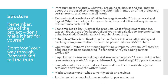Next is technological feasibility. What technology is needed — both physical and logical? What technology, if any, can be repurposed? Remember, a requirement from the Gatwick Tales Association is that they don't want you to reinvent the wheel. If they've already got an internet service provider or Cat5 cabling in every room, don't reinstall it — just use what they've got. You can make some degree of assumption there, but you need to state your assumptions.